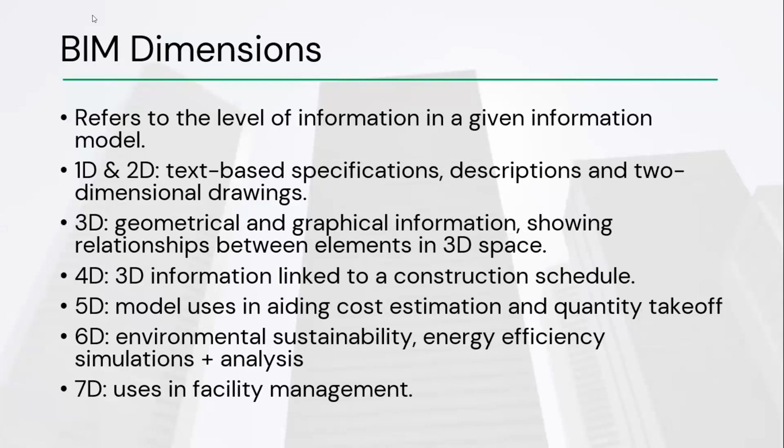If you're saying from week 1 to week 2, you're going to be working on the substructure, the substructure as modeled is going to be linked to the items in the construction schedule. If in week 2 you are doing your columns, beams and slabs for the first floor, that is connected also to the schedule.